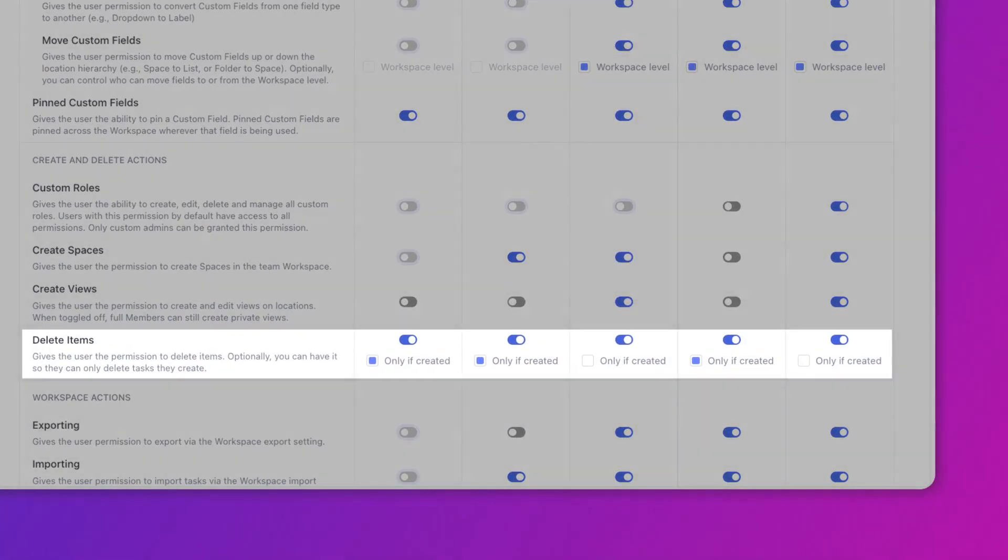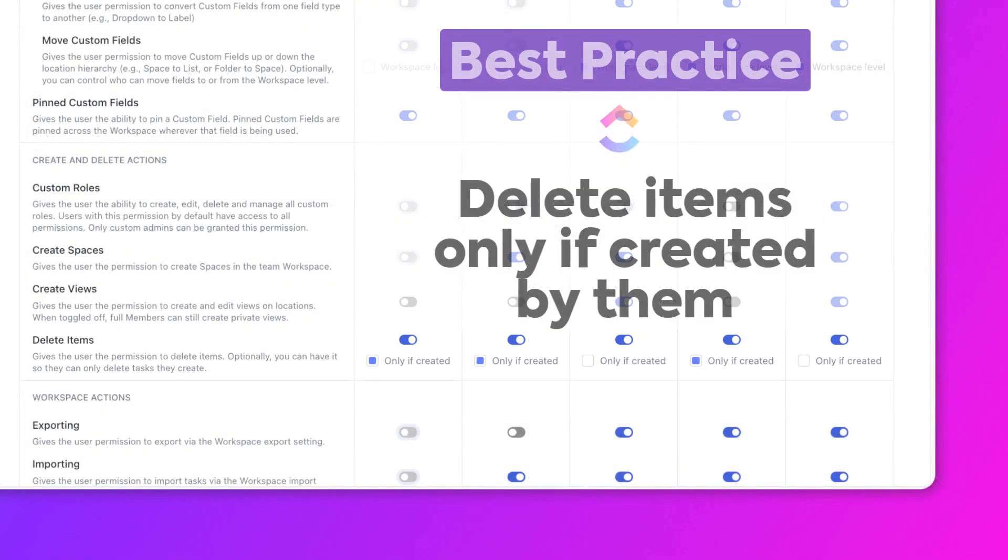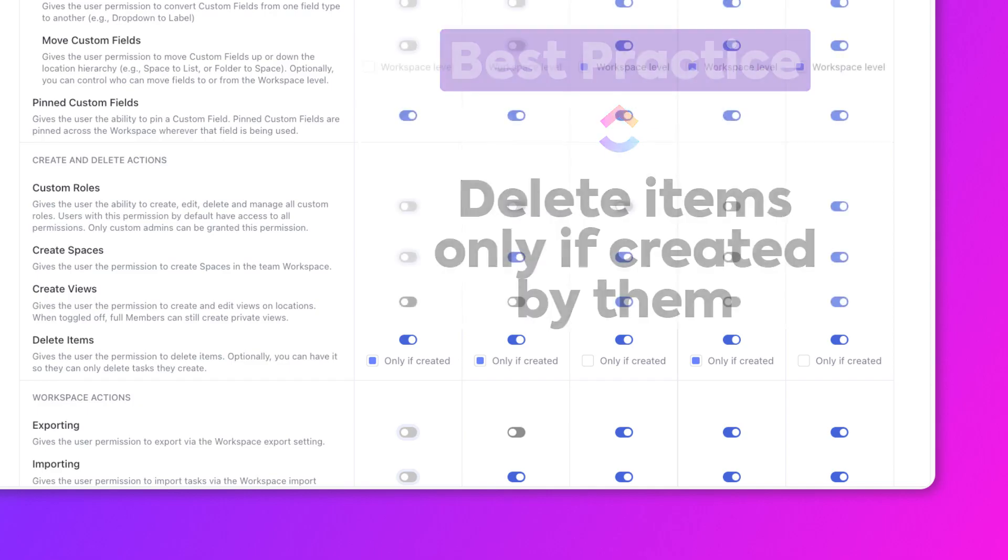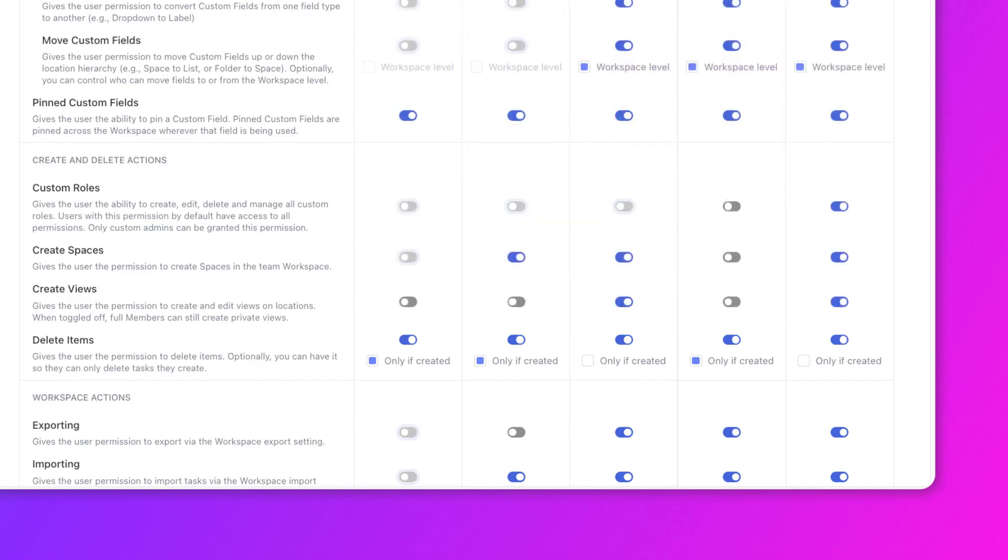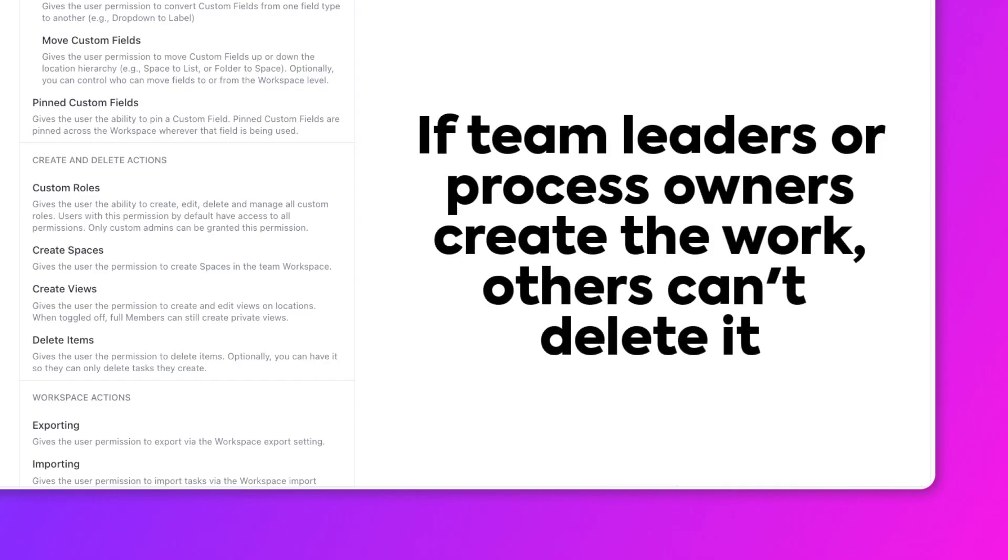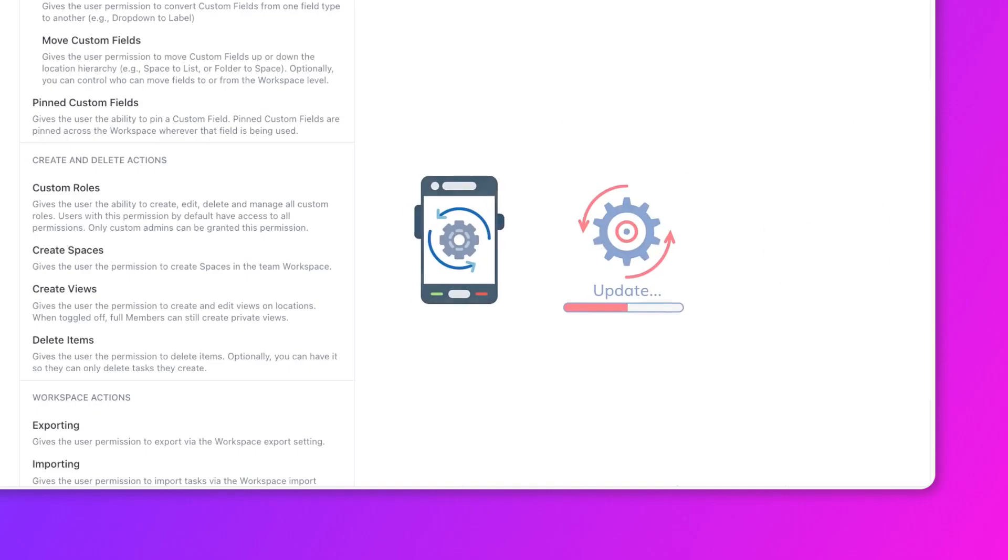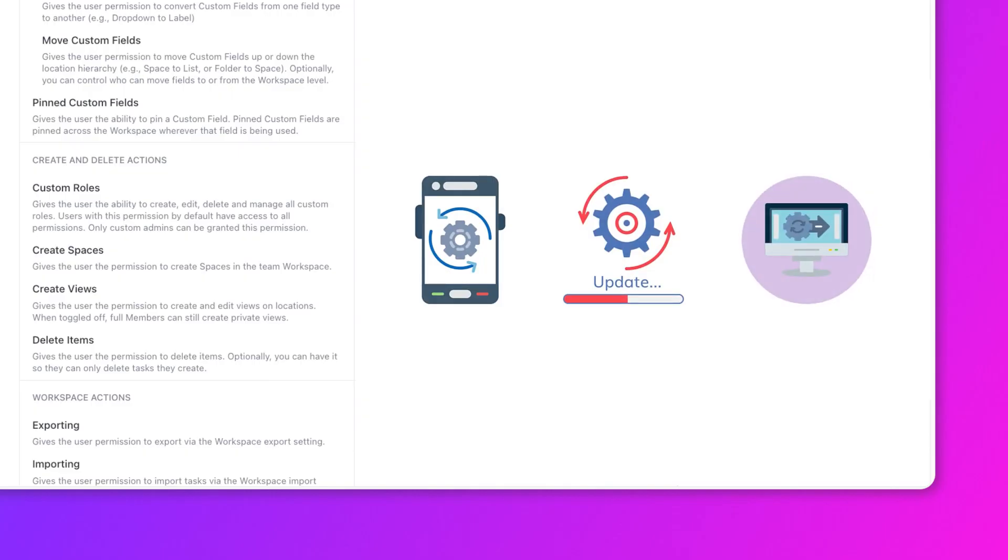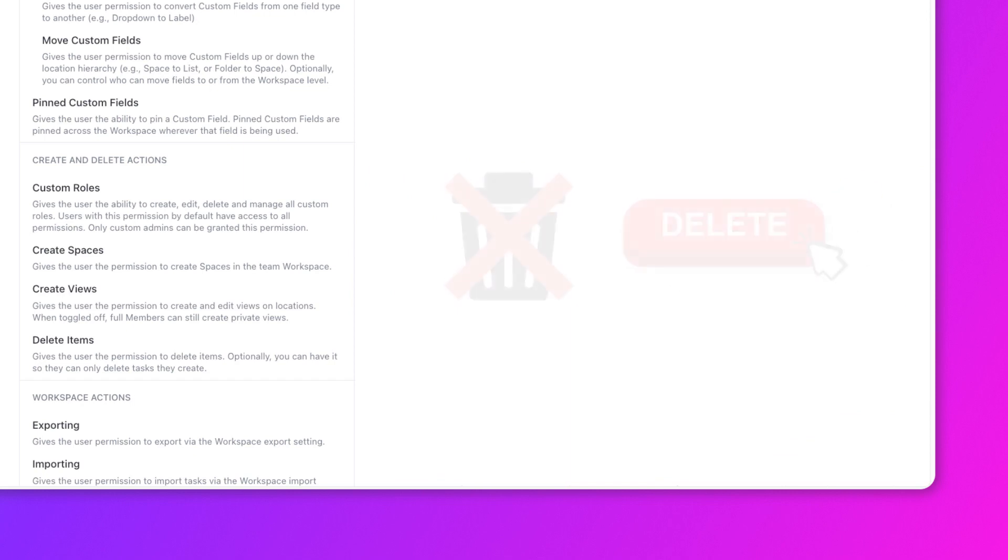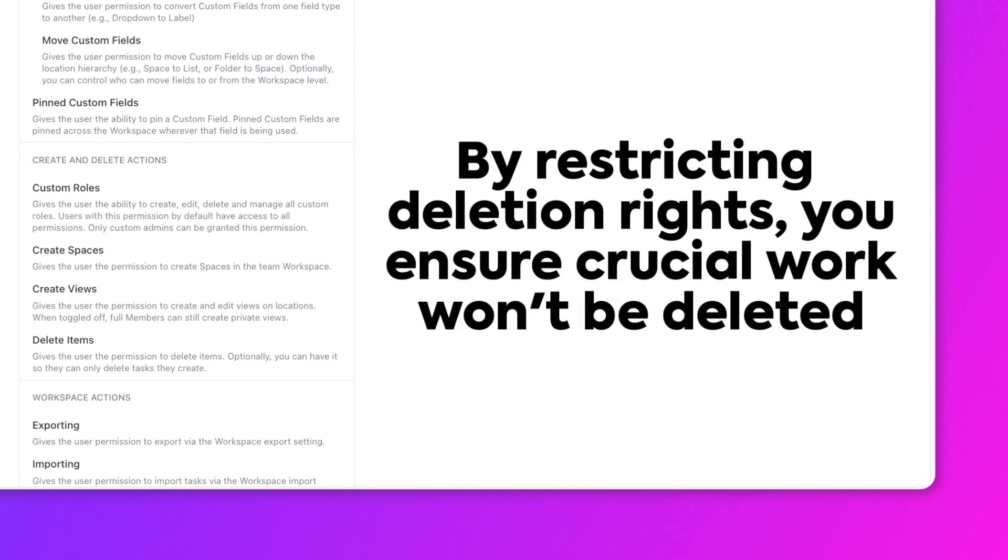The last best practice is to allow people to delete items only if they were created by them. If a team member accidentally deletes an important task or project by mistake, that can cause a major disruption to your work or your team's progress. So go ahead and select only if created here to prevent this. This way, if your team leads or process owners are creating most of the important work, other members will not be able to delete it. Imagine your engineering team is working on a critical software release. If a team member who didn't create the release plan accidentally deletes it, the entire project timeline could be thrown off, causing extra delays and additional work.